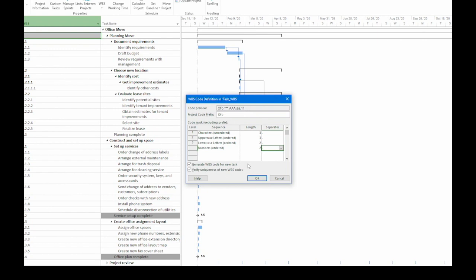Finally, take a look at the two checkboxes beneath the table. They're turned on by default. That's generally what you want. The first one generates WBS codes for new tasks. If you end up adding tasks in the middle of the project, let's say for change requests, you definitely want a WBS code for them. So keep that checkbox turned on.